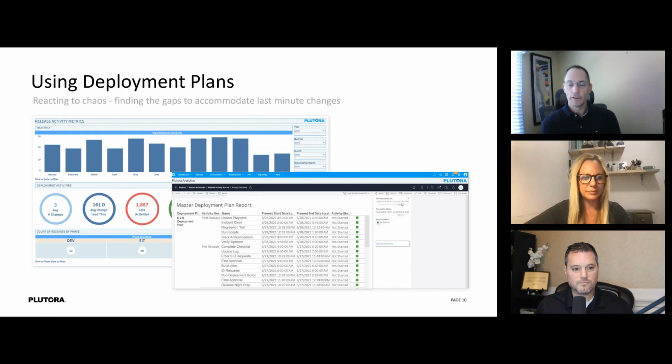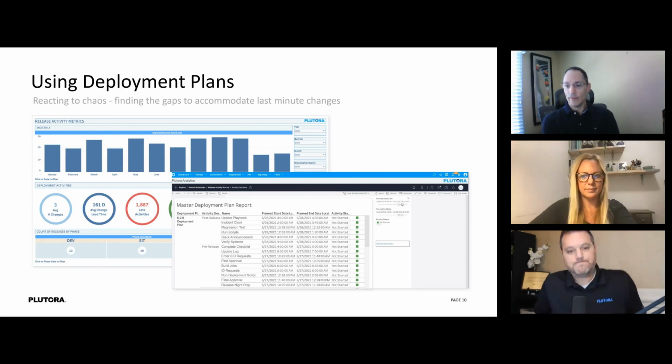Yeah, the visibility is huge. I cannot say enough about it. Right. So, again, in our organization, we do big releases. For our apps that are automated, like our mobile app, for instance, we do weekly releases and they go pretty self-contained. But most of our other apps have very high dependencies, and we do a release of 80 applications in a 3-day period every month. And there's a lot going on.